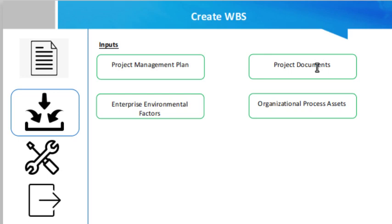Next is project documents — examples include the project scope statement and requirements documents. Then there are enterprise environmental factors, which influence the organization, the project, and its outcome. Every organization has to live and work within these factors, which can be either internal or external. Finally, organizational process assets include policies, procedures, templates for the WBS, project files from previous projects, and lessons learned from past projects.